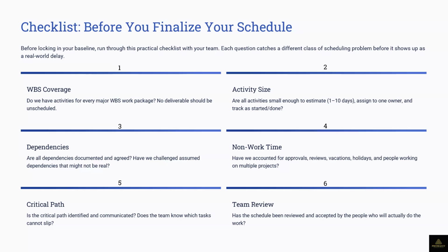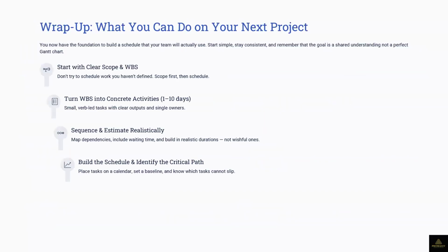And once they give it out, you have to document it. If it's a client delay, if it's your delay, whatever the issue is, you document it. Those are things that are going to be used in your lessons learned at the end of the project. So please let the team commit to it. So basically, that's what we have learned.